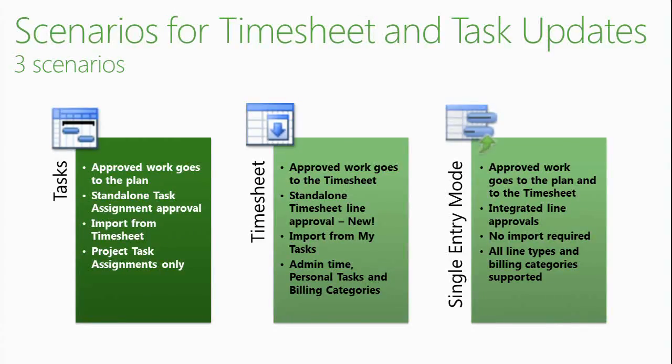before anyone can see them in PWA, and before they can be seen in the reporting database, because the action of publishing is the one that pushes everything to reporting. Saving only is not going to do anything to the reporting database.